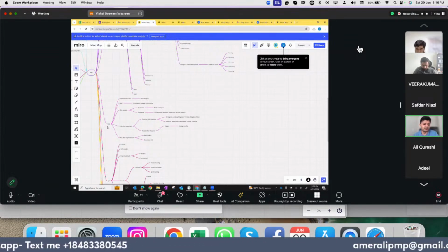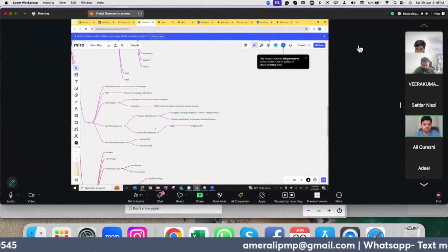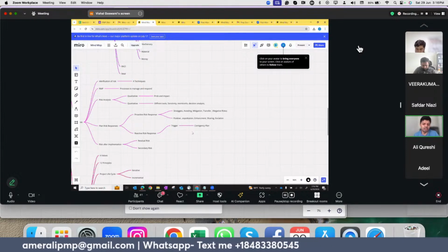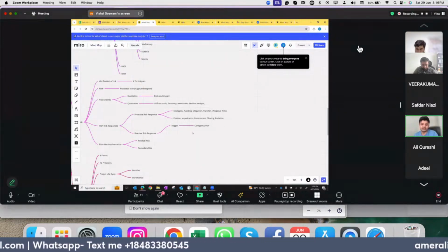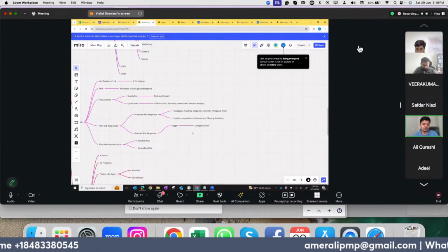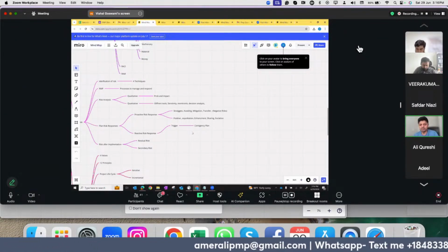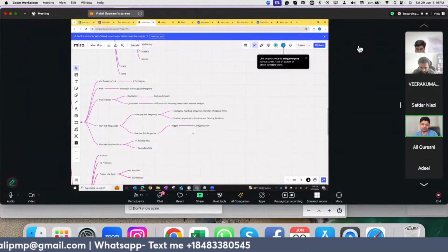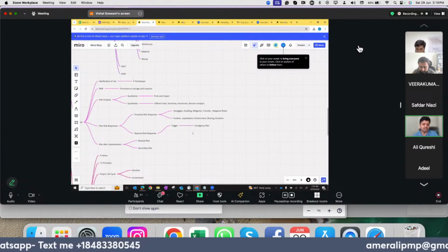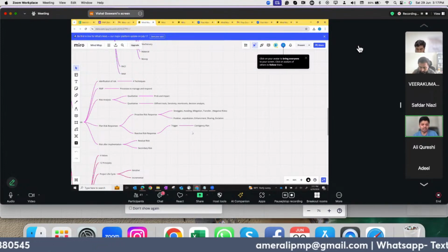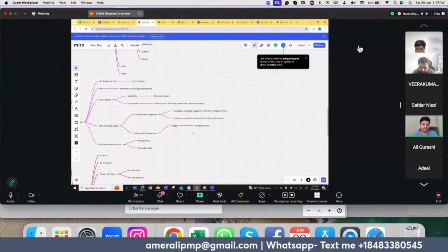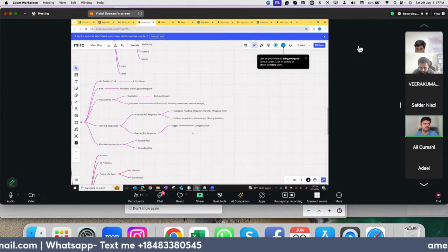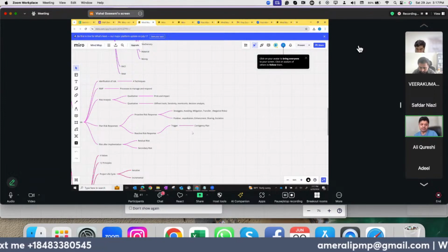We have different planned risk responses. One is a proactive risk response, which is based on the types of risks that we have. If the risks are negative, the strategies are avoiding, mitigation, transfer, and finally escalation. For positive risks, we have exploitation, enhancement, sharing, and if the risk is above our threshold, we escalate it. We have a reactive risk response, which is based on a trigger and goes to a contingency plan. Within that, there are certain risks after implementation. If they don't get resolved, we call it a residual risk, and then a secondary risk.